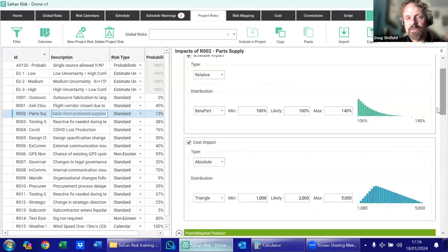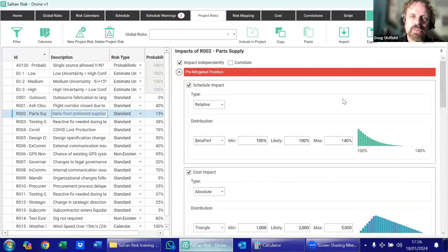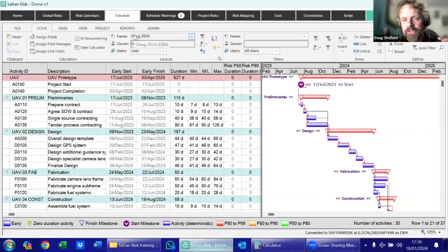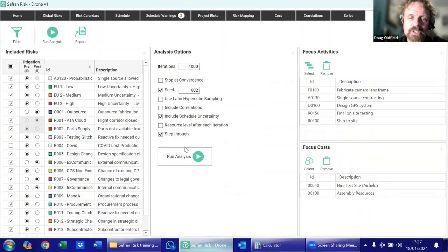And so when we're talking about a risk analysis, we often have these two different components. Now, within the schedule, what we do is link these risks to activities in the schedule, or sometimes phases, depending on what level we want to assign these risks to. And then we start the process of running a simulation. Rather than having a model where the schedule is fixed in stone, we have a model that starts to move around a little bit. To show you how that works, this is when we run a Monte Carlo simulation, we might run with 1,000 or 10,000 iterations.